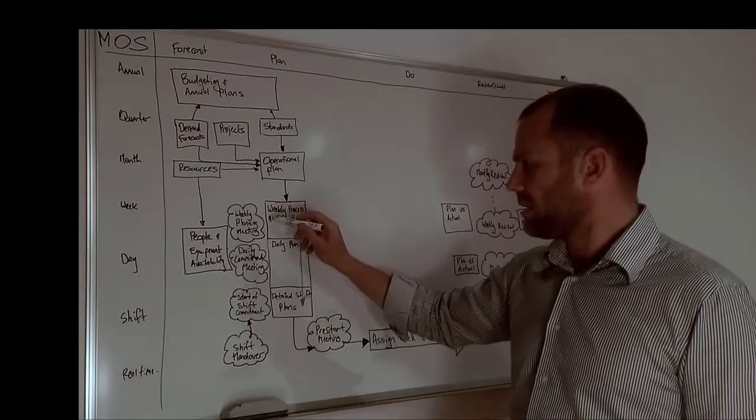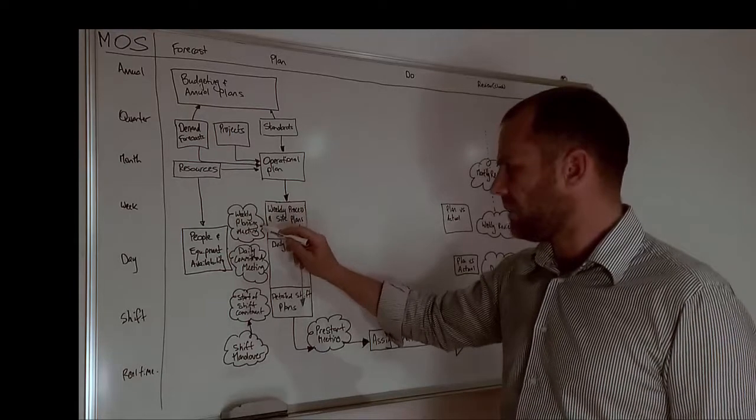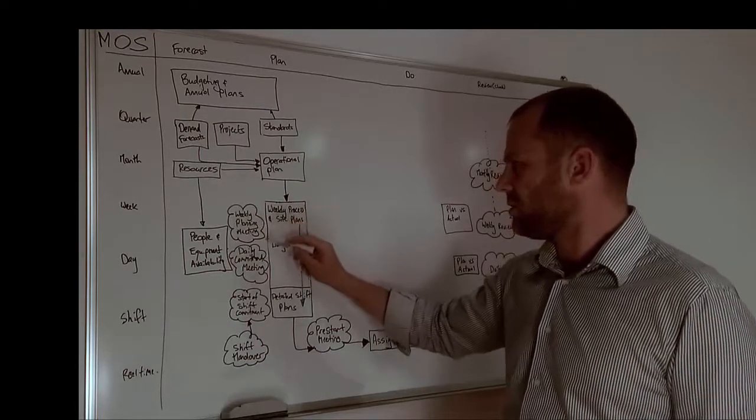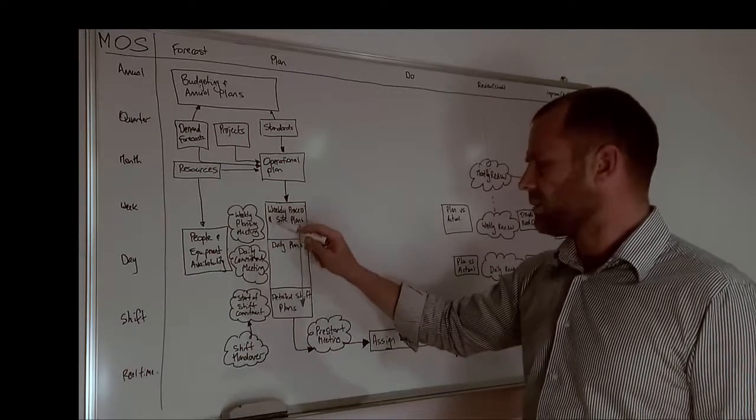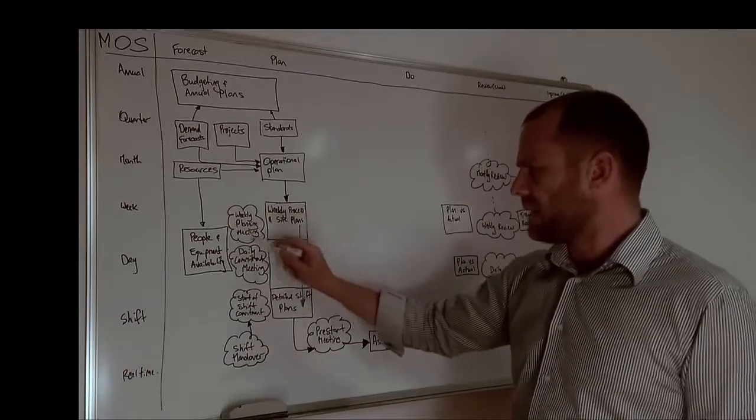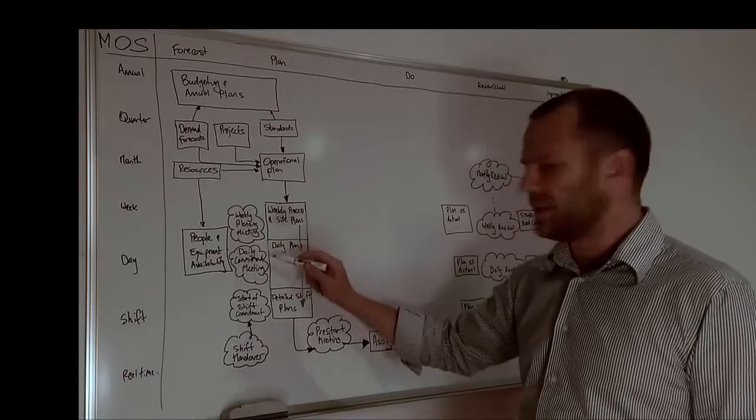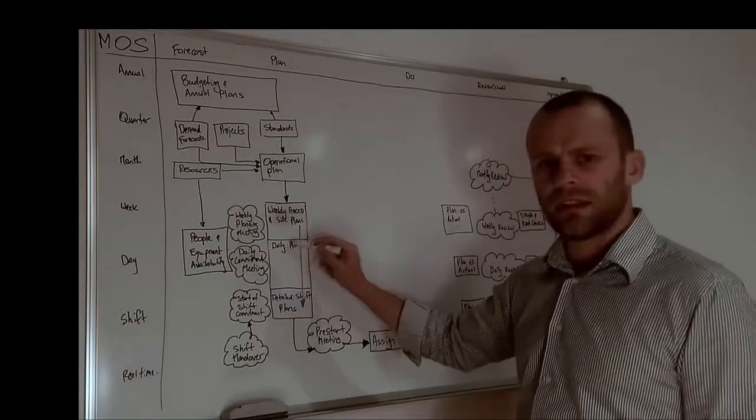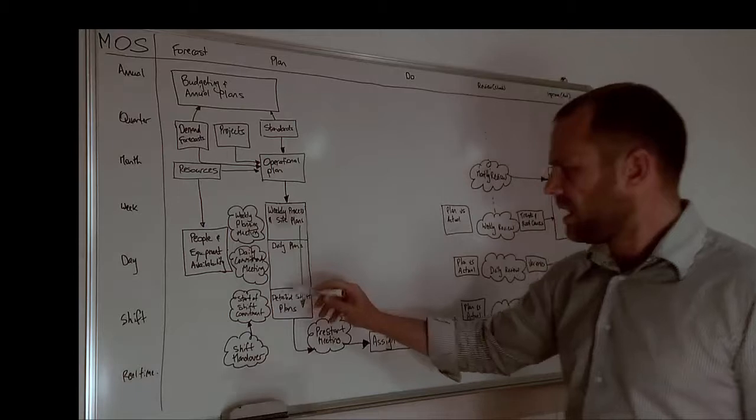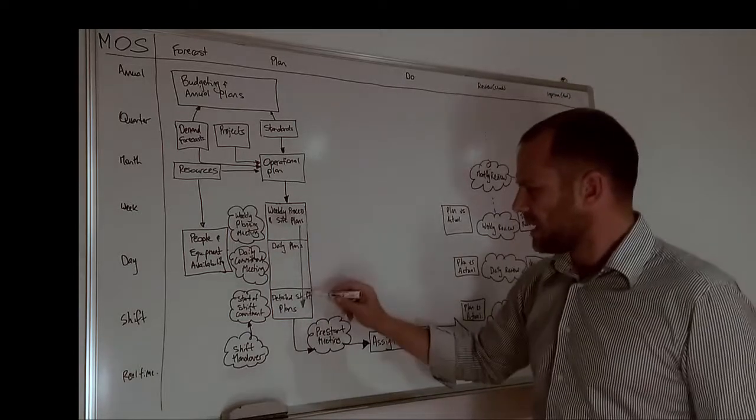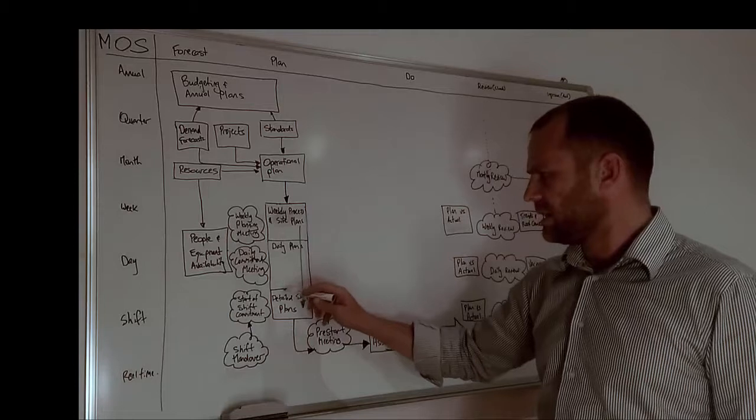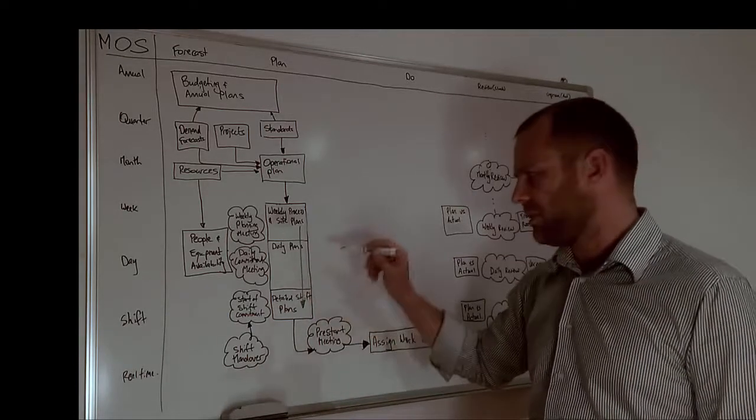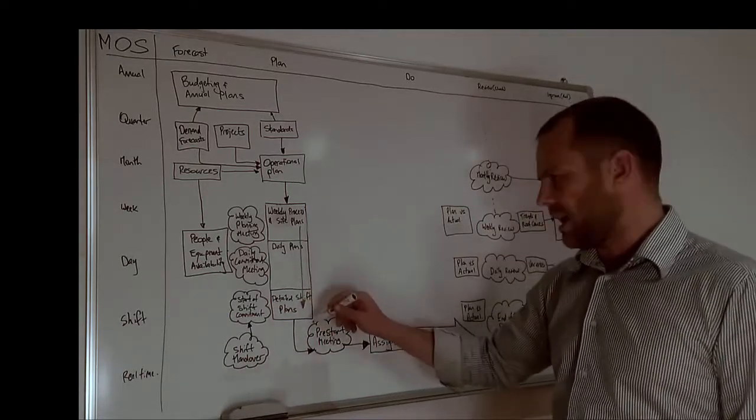Generally, on these kind of sites, you'll have a weekly planning meeting, which is designed to work out what the KPIs are that we're going to meet for the week and what targets we're going to hit. There's a daily commitment meeting when we talk about targets again and get much more into the detail of the work that's going to happen on the shift. And really, in order to make this useful for the supervisor, we need to get into some really good detail about exactly what's going to happen, who's going to do it, where it's going to happen, etc.